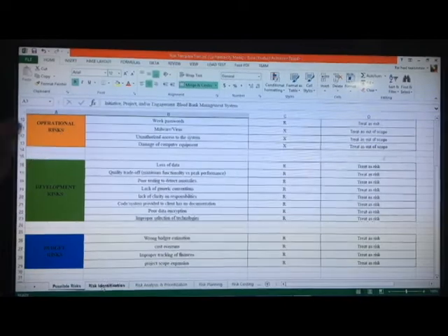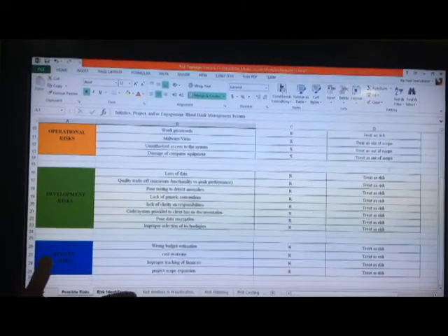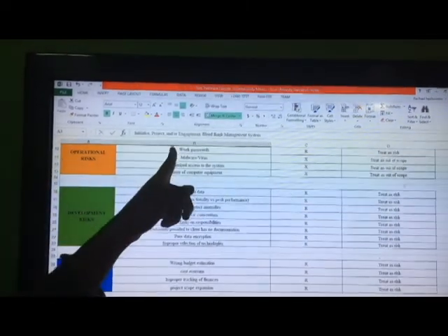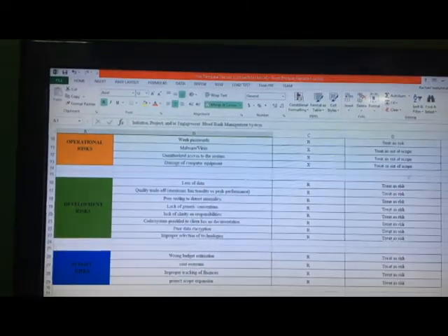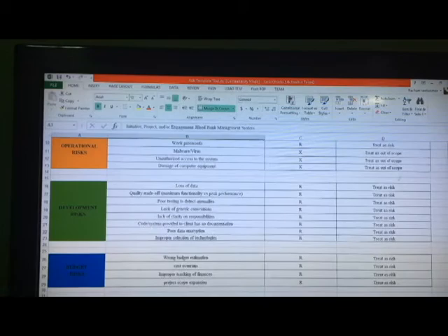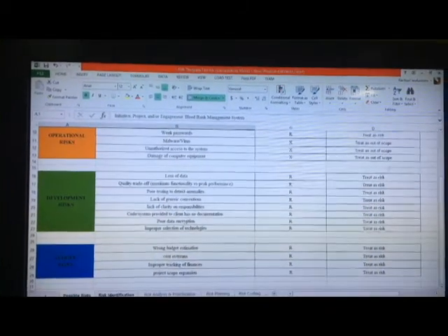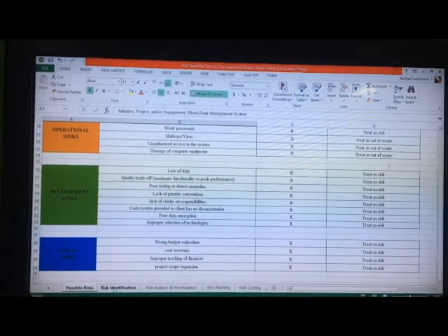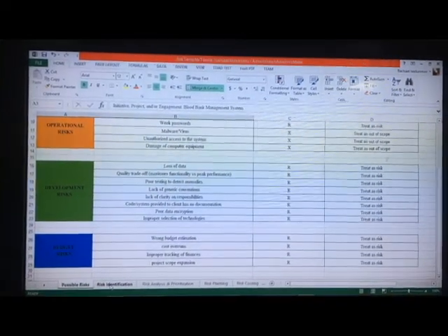The operational risk will happen during the use of the system after it has been deployed to the client. For example, the client could set a weak password, and this will be treated as a risk because it will leave our system vulnerable to hackers. So we treat this as a risk and provide a medium for the clients to take precaution against this risk.